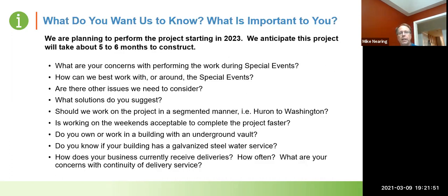Here's the important part of the meeting. What do you want us to know? What's important to you? So, a little bit of background about this work. We are planning to perform the project starting in 2023, as I alluded to in an earlier slide. We anticipate that this work will probably take about 5 to 6 months to construct from beginning to end, and again, that assumes good weather and other things like that. So again, a large project, impactful. It will linger on for a while.